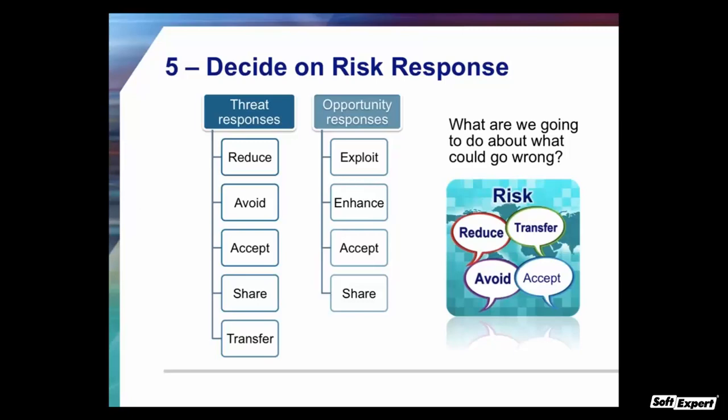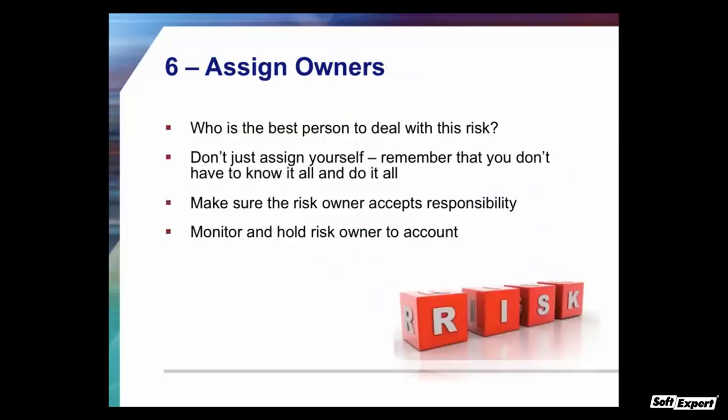The sixth step is to assign owners, now that you've decided what to do about each risk. This is where many project managers go wrong — they simply assign themselves to all the risks. But you must assign the right owner for each risk and make sure that owner accepts responsibility. One of the best ways is making sure people are part of deciding who owns each risk — don't just decide as a project manager. Decide this in collaboration.